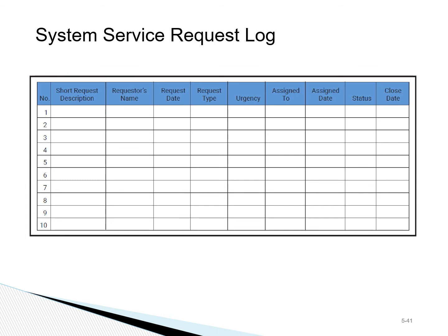As part of the analysis of each request, we need to assess the impact on cost and schedule, and that information needs to be in place before approval of the change. And if the change is approved, then of course we need to update our baseline cost and schedule to reflect that change. This essentially is the tool we use to control the scope in the scope management process.